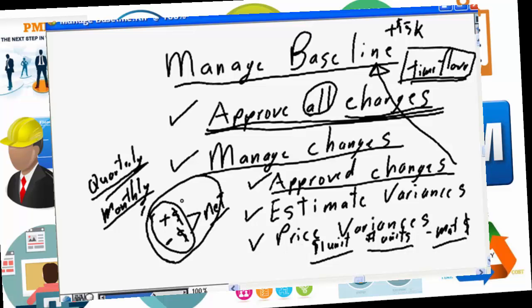You understand the difference. Again, you accumulate them on the appropriate basis, probably monthly for short duration projects, probably quarterly for longer duration projects, and then you work with management to decide, what are we going to do about it? Are we going to accept the budget overrun? Are we going to change the scope, the functionality, to try to deliver within the original costs with less function?